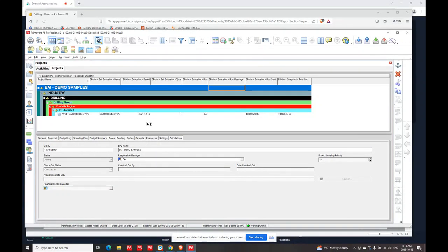But I know I've worked turnarounds where for the green up reports, we had people come into the boardroom where we were having our meetings half an hour before the meeting started so that they could update basically the roll up of the green up reports, which was being manually done on a big sheet of paper on the wall. Now you can of course run those off of your schedule, but you have to make sure that you've got updates, coding correctly, all that kind of thing. This does all that type of scenario. You just need to make sure your updates are in there correctly, reschedule it, do your analysis. It's a way to the races with it.